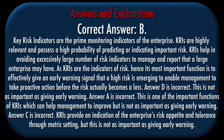Correct answer: B. Explanation: Key risk indicators are the prime monitoring indicators of the enterprise. KRIs are highly relevant and possess a high probability of predicting or indicating important risk. KRIs help in avoiding an excessively large number of risk indicators to manage and report. As KRIs are indicators of risk, their most important function is to effectively give an early warning signal that a high risk is emerging, to enable management to take proactive action before the risk actually becomes a loss. Answers D, A, and C are all important functions of KRIs but are not as important as giving an early warning signal.